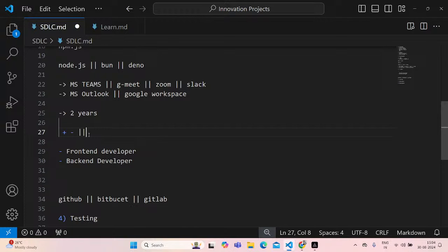One person will say I can finish this task in 3 days, another will say we can finish this in 5 days. Story points are not exactly days, but for example you can consider them as days: 3, 5, and 8 is the biggest one. 8 story points means you should finish in 1 week. 5 story points means you can finish in 3 or 4 days. 3 story points means you should be able to finish in 2 or 3 days. That's the calculation.